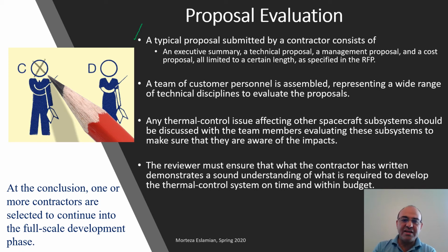Okay, then a team. So let's say multiple responses to proposals have come in. Then a team of the customer personnel is assembled, representing a wide range of technical disciplines to evaluate the proposals.